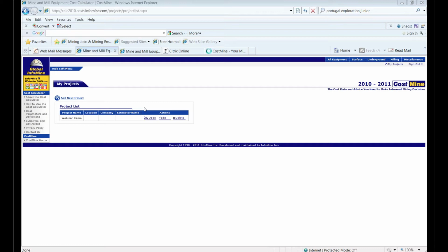The information provided is generally not provided as actual model numbers. How we present the information is by the specs for the equipment. So you're looking for a 300-ton truck. You're looking for a shovel of a certain capacity, this type of thing. So it gives a good basis for an estimate, and then as you are moving through your project and feasibility studies or in operations, you will of course be able to refine that information.